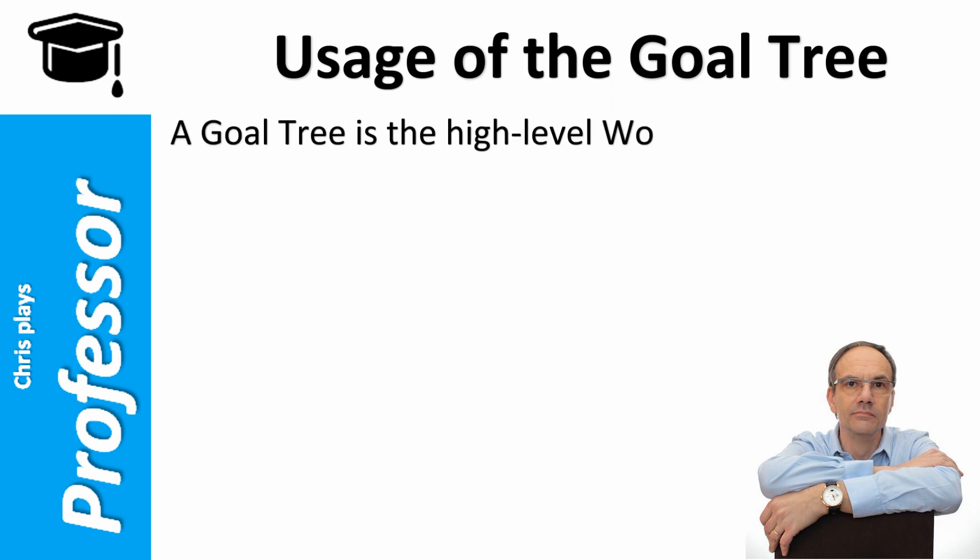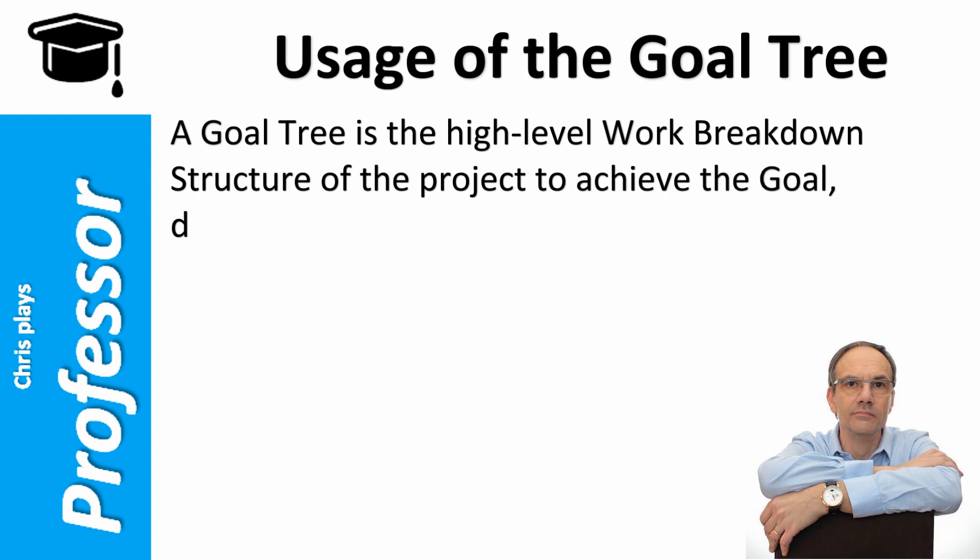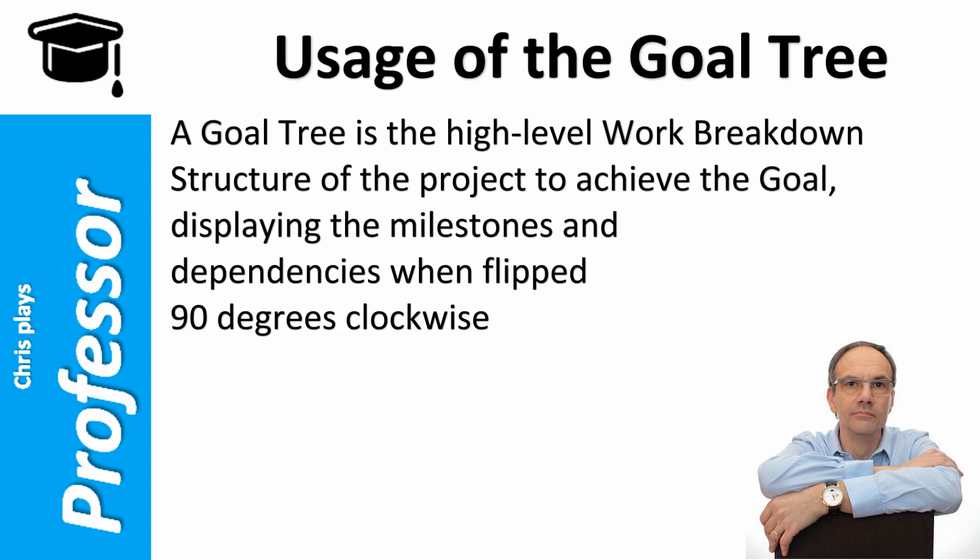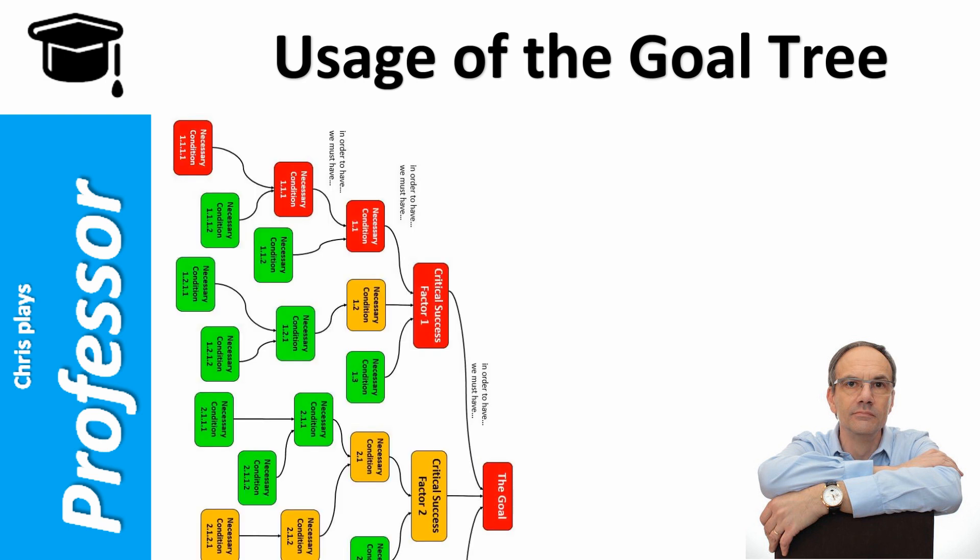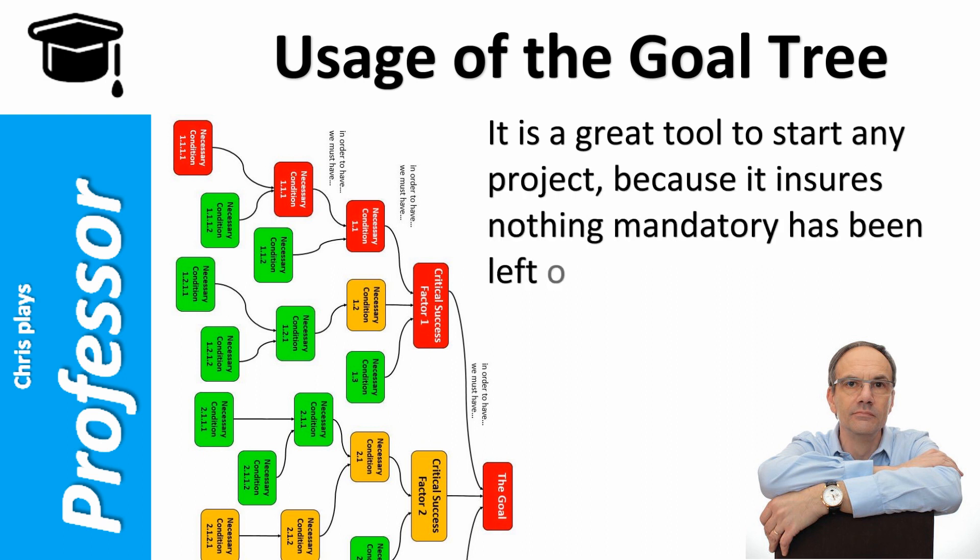Finally, a goal tree is a high-level work breakdown structure of the project to achieve the goal, displaying the milestones and dependencies when flipped 90 degrees clockwise. It is a great tool to start any project because it ensures nothing mandatory has been left out.